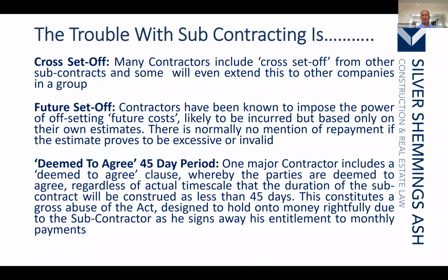Julie, any questions? There are indeed. Someone's asking, does the subcontractor order supersede all the tender's exclusions? Well, it's back to the start. Not necessarily, because the subcontract order may not be a subcontract order. If the subcontract order has been signed or agreed to, that creates a contract, and then it depends on what that contract incorporates or not. And it could incorporate previous tender offers and everything.